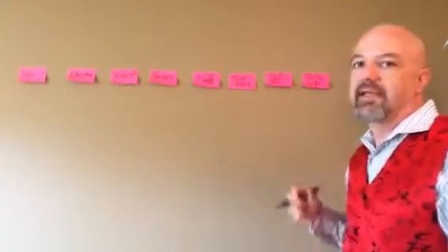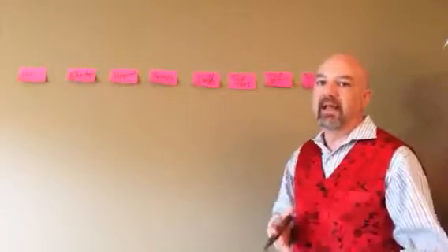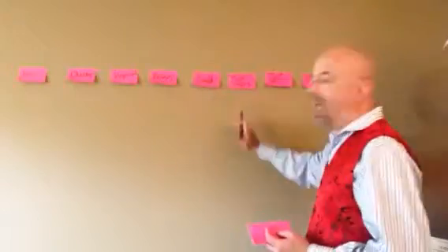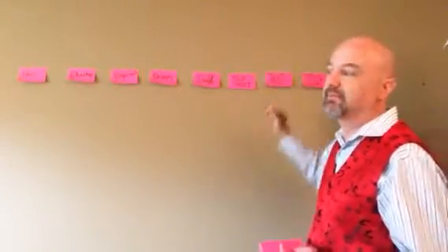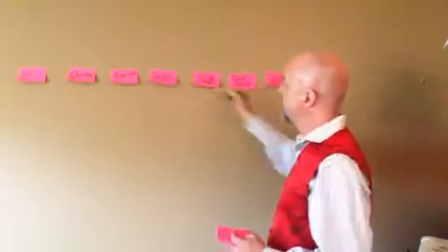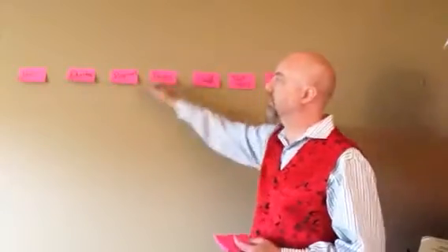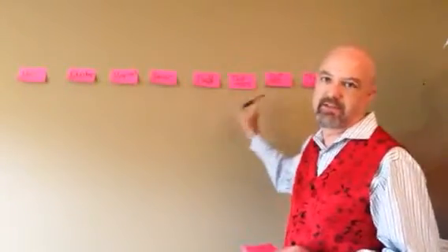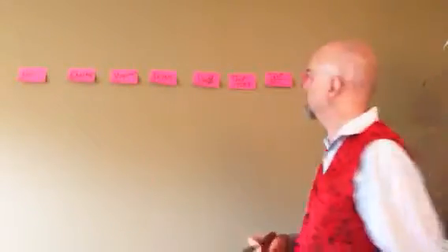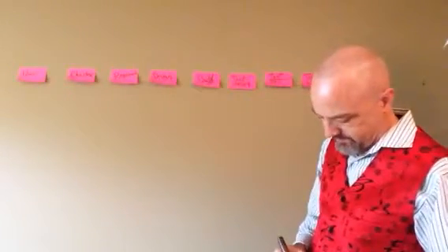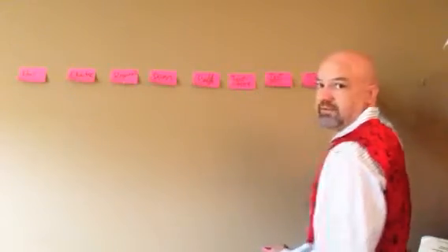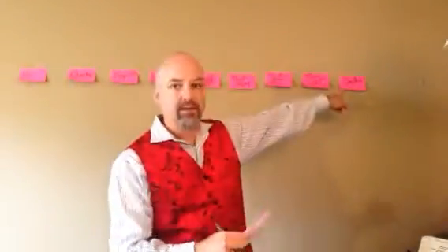Now, if you end up taking that environment to a completely agile context, then you can reduce the big bang jumps here. You still do this testing, but you do it in smaller increments, all in this design, build, test. This all becomes one chunk of work, right? Design, build, test, design, build, test, design, build, test. And you're deploying at the end of every release, or at the end of every 3 or 4 or 5 releases. Test and then deploy. All right, so you just stick these suckers up here. Let's deploy off the screen. Not quite. So deploy is way over here. All right, you can see that.